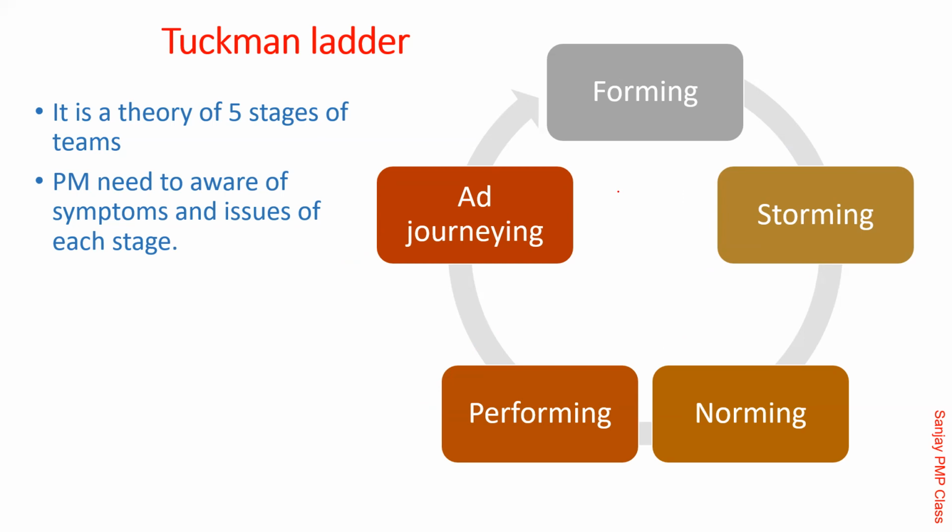Now, why? Because you as a project manager need to be aware. There are 2 things you can do. First thing, under the storming, don't take any harsh decision. Remember, what people speak in the storming stage is not necessarily what they mean. It only is a psychological thing which is making them speak like this.